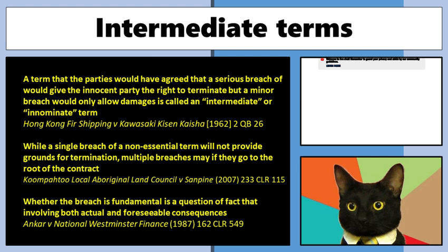All right, but also note with a lot of these things, if you map the stuff out ahead of time, you can actually come to an agreement. This being up to this amount of time late each day is considered a warranty, but being this late is going to be breach of condition. Parties can put whatever they like in their contracts, and the courts can use that to help analyze those. All right.